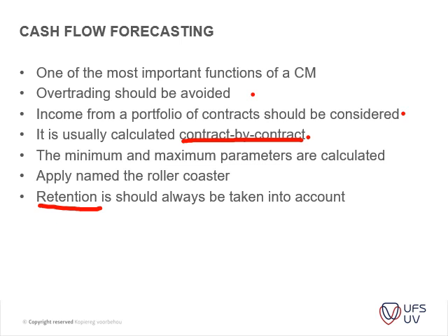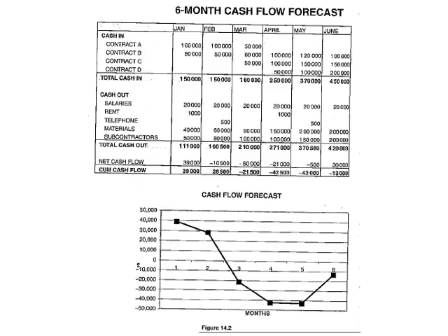So most of the contractors try and price their P's and G's in such a way that that 10% is actually the profit that they get after a year's retention. You should also consider having a retention on your subcontractors as well, to lessen the load on your cash flow.